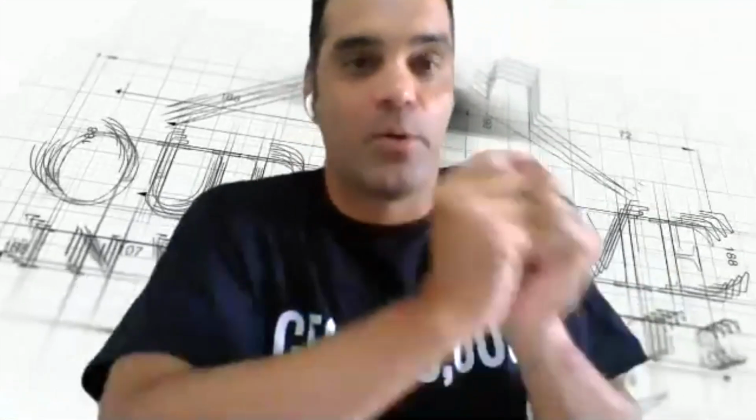So if I pay a home inspector $700 to go through that house and give me a whole huge report, that 80-page, 100-page report, here you go, contractor, this is your punch list. Make sure you catch every one of these things, not even the little things like that outlet cover was crooked. You make sure you catch every one thing. Then I don't have to be crawling in the attic with my suit on and looking at the beams. The best I could do, I'm not going to do as deep an inspection as those guys. You can get an inspection where they check the pinholes and the paint. And so I give that report, especially in these high-end houses, to my contractor as my punch list.